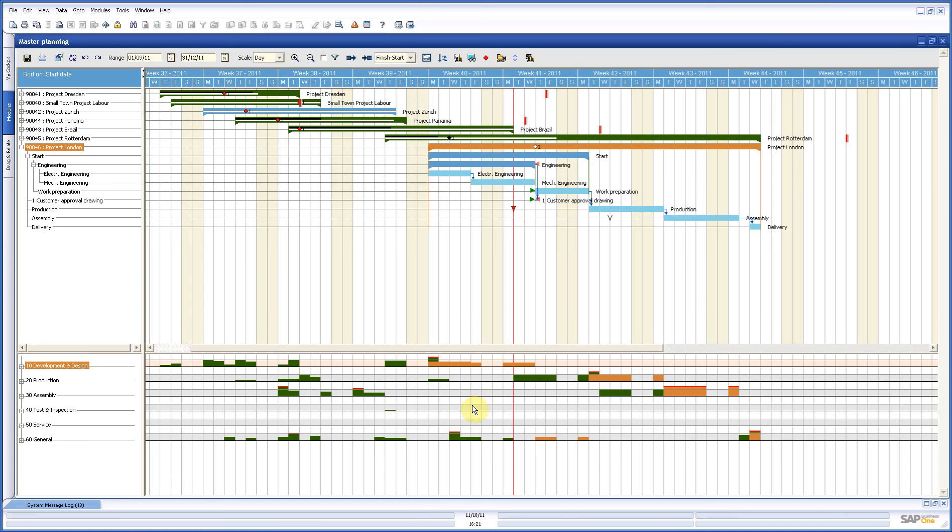And if you have any problems like here, like here, there, it turns out red. And red says you need more capacity. And how you do that, that is your case because you are the planner.